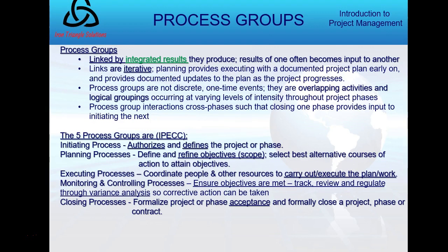A project gate, this is a new term to the Project Management Body of Knowledge, is held at the end of each phase, where you might compare the project performance, look at the level of detail, and assess expected changes.